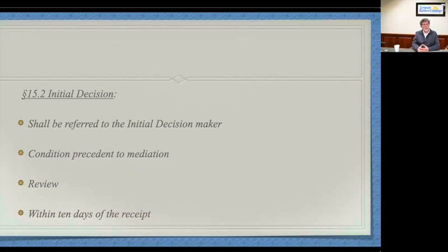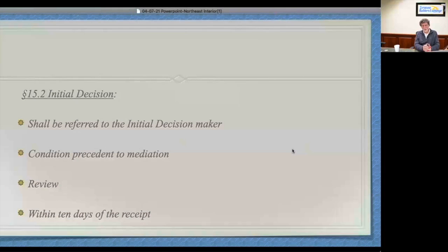And the owner developer made a motion to dismiss that part of the claims, let's call it 2.8, because of this. And it was a problem. We managed to beat it. Case ultimately settled, a good seven-figure settlement. And the only reason we could beat it was because we learned in discovery that the owner and the architect were at odds. The architect stopped working, owner wasn't paying them, and the architect wasn't acting on any claims. So we made the argument to court in Westchester County that it would have been a futile act and that it was waived, and we got by. Okay. But the fact is, you gotta give it to the right person within the right amount of time and ask for the right procedure, whether it's an initial decision or whatever.